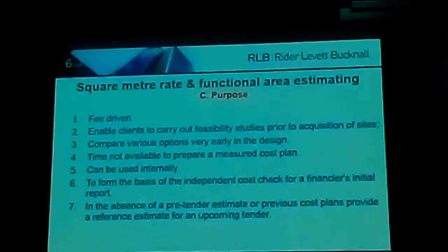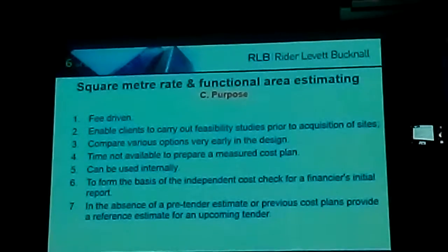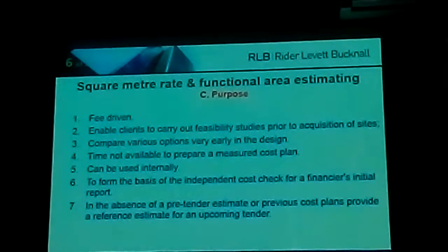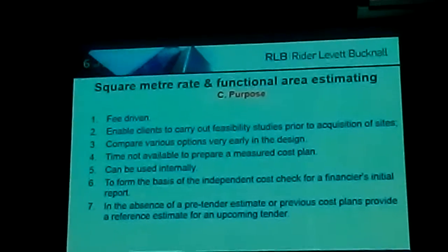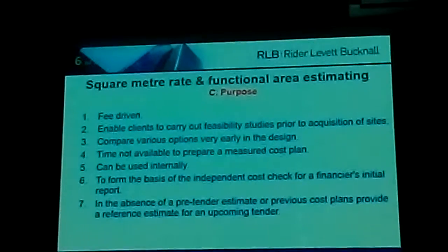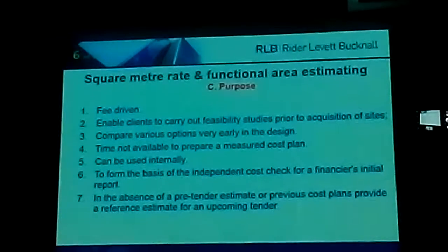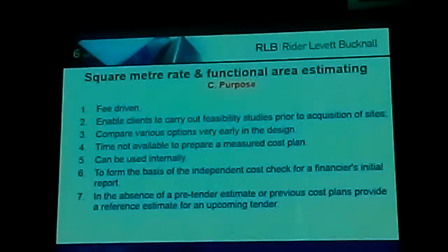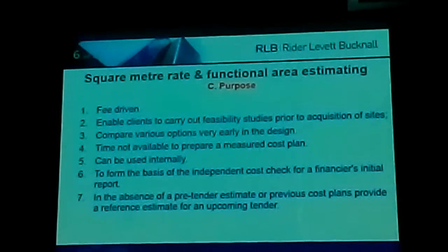Why do we prepare these estimates? In a lot of cases, they are fee-driven, given the client is after a quick answer with minimal cost. This therefore enables them to carry out feasibility studies prior to acquisition of sites, so they can set or compare against sales rates and also give an indication of market conditions. The estimates can also be used to compare various options very early on in the design process. The time may not be available to prepare a measured cost plan.